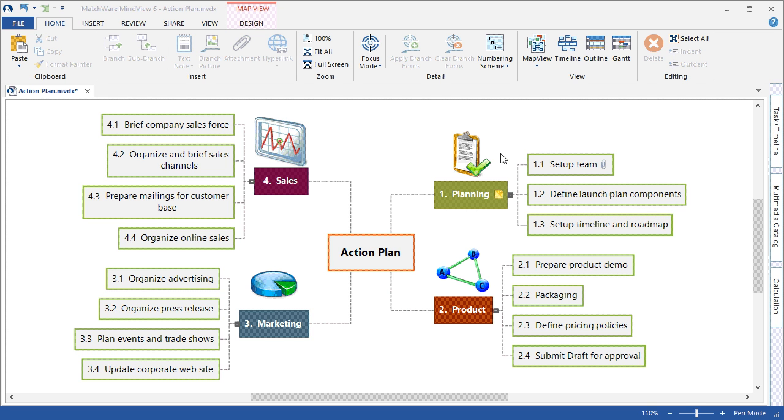In this example, I've applied a numbering scheme to the mind map to show the clockwise hierarchy of the branches. As we migrate towards the Gantt chart view, this clockwise order will also become the linear order of the Gantt chart outline.